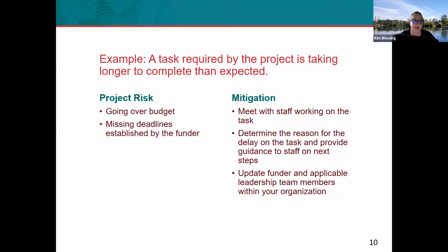The risk to your project with this scenario is you could go over budget. If it's taking them more labor hours to get the work done, that could put you over budget. It could also lead to missing deadlines that have already been established by the funder. So you've got the deadline set in your work plan, but it's taking longer than anticipated to get it done, and that completion date is at risk.